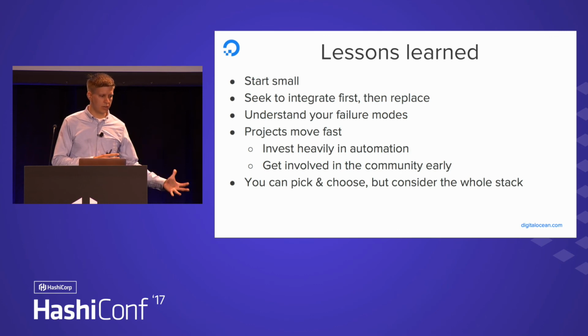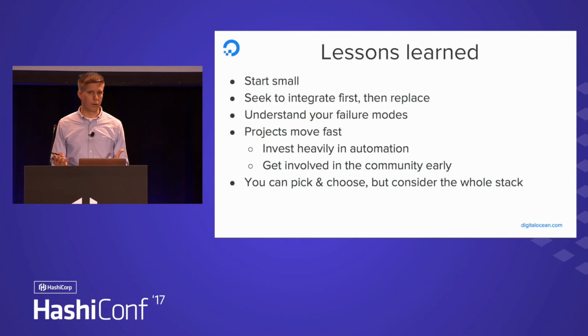But if you slowly integrate, you put it alongside the existing tool and then you migrate things over slowly, that tends to work pretty well. And before you know it, you'll basically be at a point where everything's migrated from the old system to the new system, and you can just cut off the old system and you're done. But I really recommend integrating with the existing systems first and then working your way up from there.